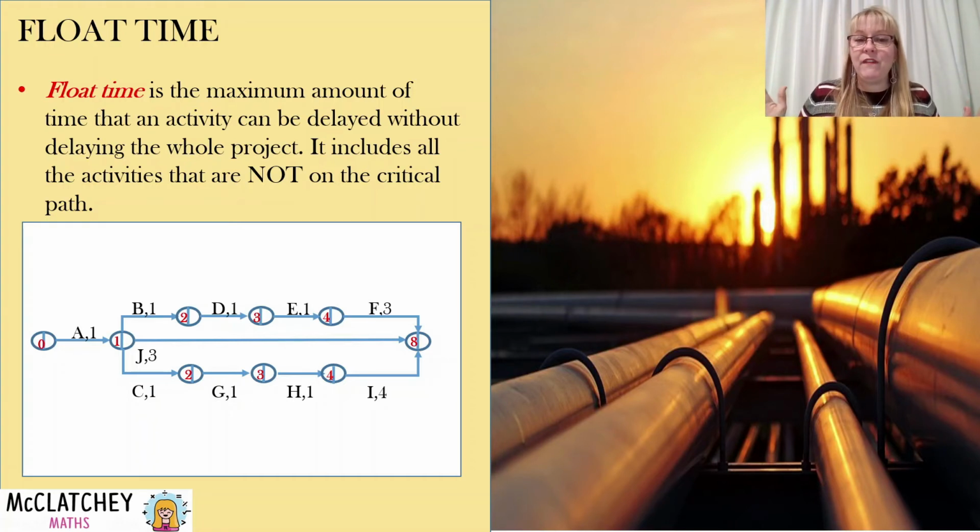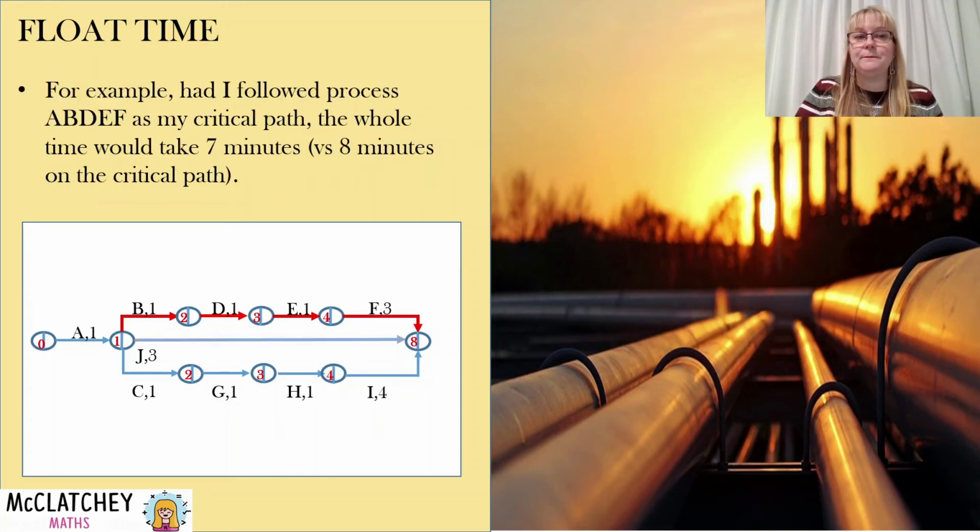However, you remember when we added up the top edges, it added up to 7 minutes, and that middle edge, which was pathway AJ, only adds up to 4 minutes. So that difference between the total time of 8 minutes and the total time of that edge is what we call float time of that part of the process. So these two pathways shown in red all have float time. Every one of those activities there has float time.